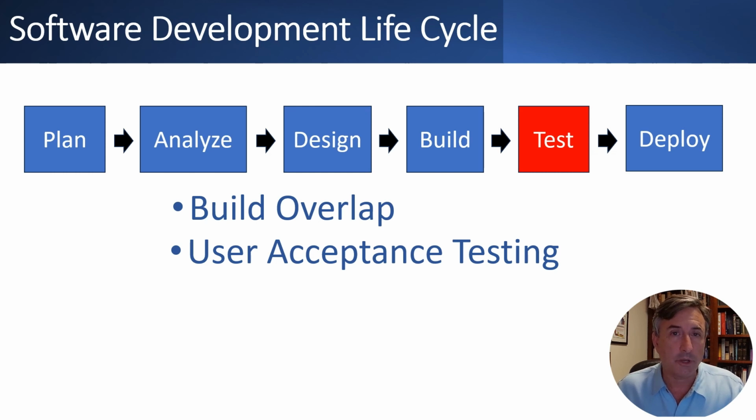And then the other issue is, as soon as those end users get their hands on the software and start doing some testing, they're going to come up with additional requirements. Oh, I forgot to mention this, or they're going to find little bugs and things like that. And then your job as the product owner is to prioritize those requirements and bugs, and make the ultimate decision of: are these so severe that we've got to change them before we release the first release, or can we wait until a future release?